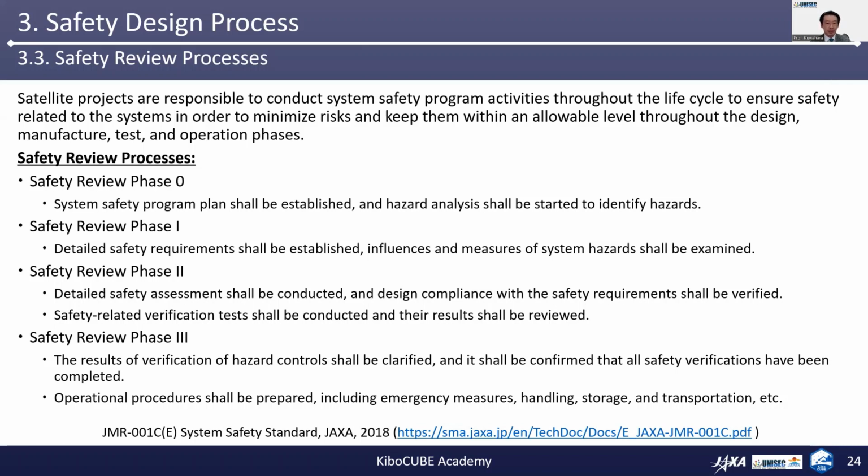In phase 3, the results from the verification of hazard controls shall be clarified, and it shall be confirmed that all safety verifications have been completed. So this phase is also where operational procedures shall be prepared, including emergency measures, handling, storage, and transportation, etc. The details of these definitions are described in the reference document below.